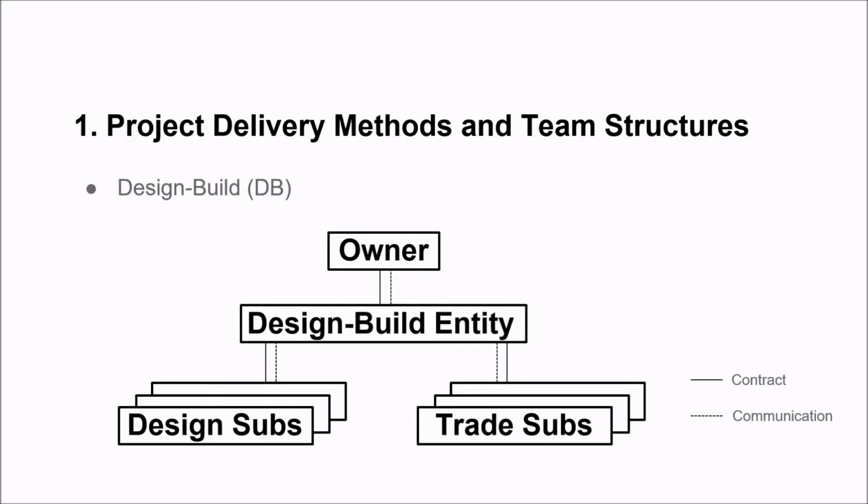They go on to explain that, quote, there are disadvantages as well. The owner may not have the security and comfort of having an AE act as their agent during the project. Even if the owner has an independent AE involved in oversight of the project, the AE does not have as much insight into the design details. As such, with design build, the owner will lose some control of the design process.